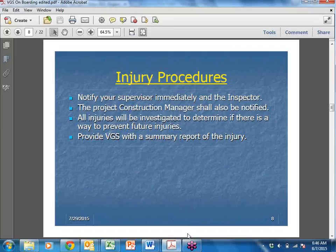This is something that happened to us this week. We had a little vehicle incident. A vehicle kind of ended up in a ditch. They did a safety shutdown for us on the project. It took us a little bit to come up with all of our causal factors and corrective actions, but it's an important thing because we really just fixed an issue that would have been a really big issue down the road. Something very small happened. It's going to improve the job site and hopefully give us a safer road going into our drill areas.